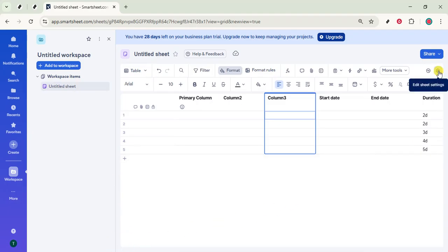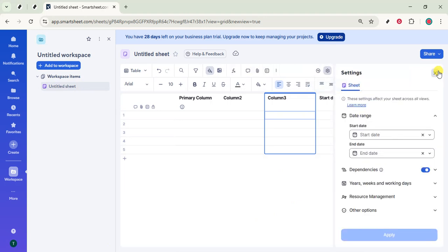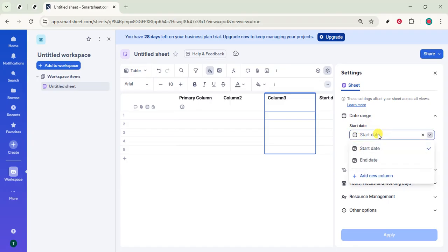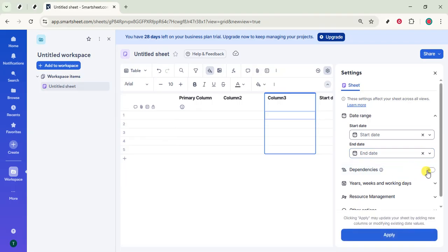This panel controls how Smartsheet calculates dates, durations, and the Gantt timeline. So it's the right place to set up holidays. Before we add holidays, make sure the date range for your project fits the period you're planning. In the Settings panel, choose a date range that covers all the months or years you'll be scheduling. This helps the Gantt view and calculations align with the period you actually care about.